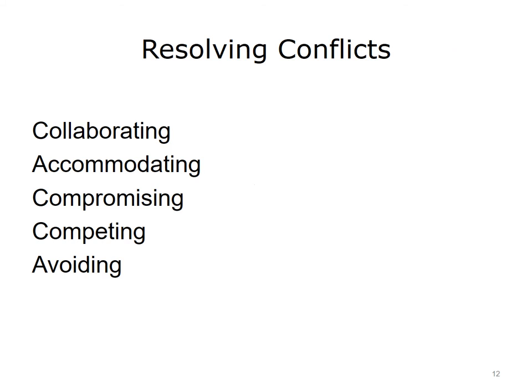Conflict is inevitable. The most common causes of conflict in projects are schedules, project priorities, resources, and technical opinions. Collaboration is the first method for resolving conflict: participants share the workload to achieve group goals, open discussion leads to cooperation, negotiation, and creative solutions, and it requires a high level of trust. Collaboration is especially effective when people are willing to change their thinking as more information is found. However, it can be challenging when animosity exists, takes lots of time and energy, and some people may take advantage of others' trust and openness.